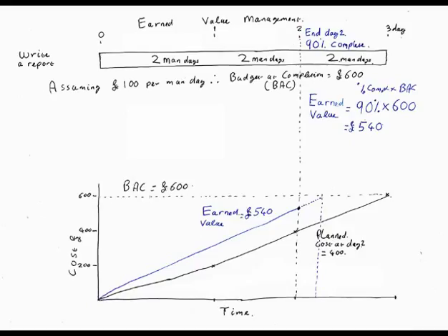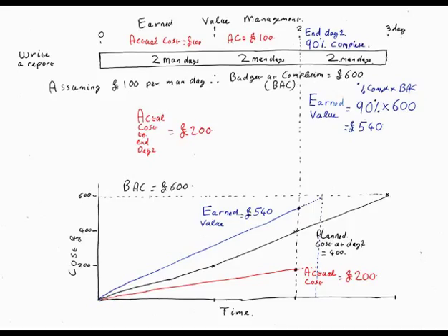Now, that's measured my progress against the schedule. What I haven't measured is how much I've spent to achieve that progress. And that information would come from the timesheets, probably. So these two people have filled in a timesheet. You could say, well, why have I got so far ahead? It's because I had a similar report that I'd written the previous week that I just reworked. So I didn't need to use two people each day. I only needed to use one person each day.